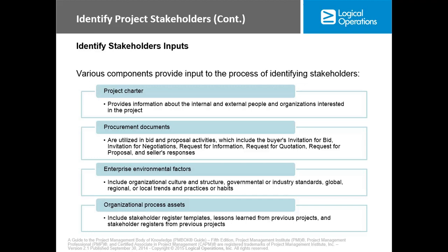For instance, on Fridays in this part of the world, Muslims go to pray at a particular time. So if those Muslims are in your project as project team members, or they are part of a contractual relationship, maybe a third-party contractor, and so on, you must take that into consideration when you are scheduling the timing. Now, in this part of the world, the Christians don't work on Sunday. Many of them don't. So when you are scheduling your timing, you must take that into consideration.